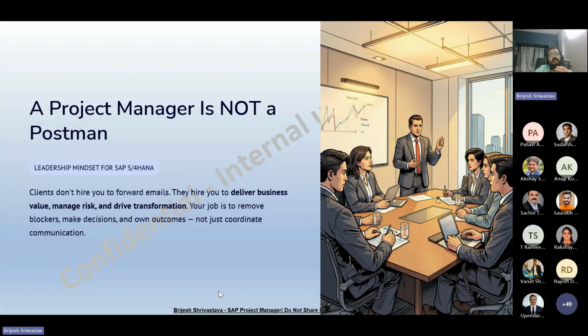Take a decision. For example, if the business says we have a critical issue before go live, don't simply forward the email to your SAP consultant and wait. Instead, ask what the business impact is, which module is affected, whether this is blocking testing or go live, what the available options are, who owns the resolution, and by when we can resolve it. Then bring the right people together and remove the blocker.